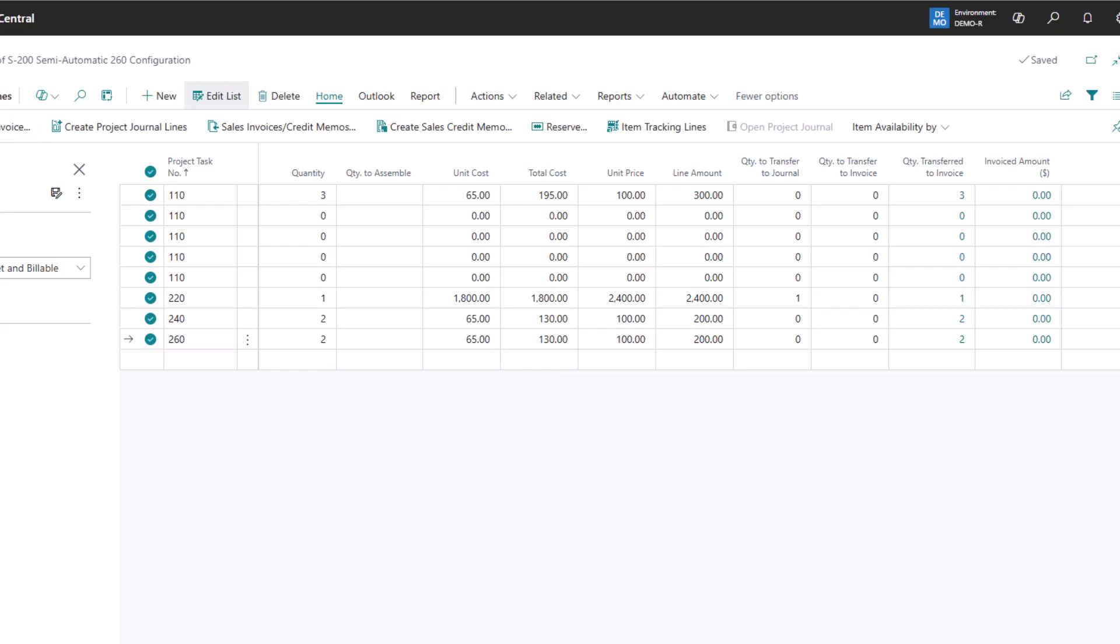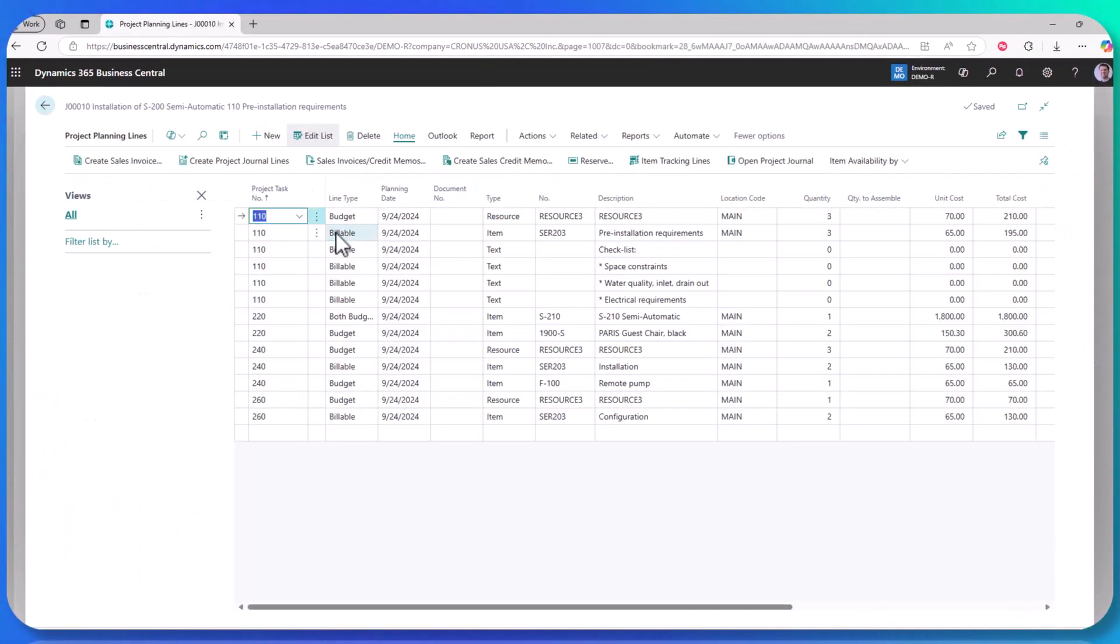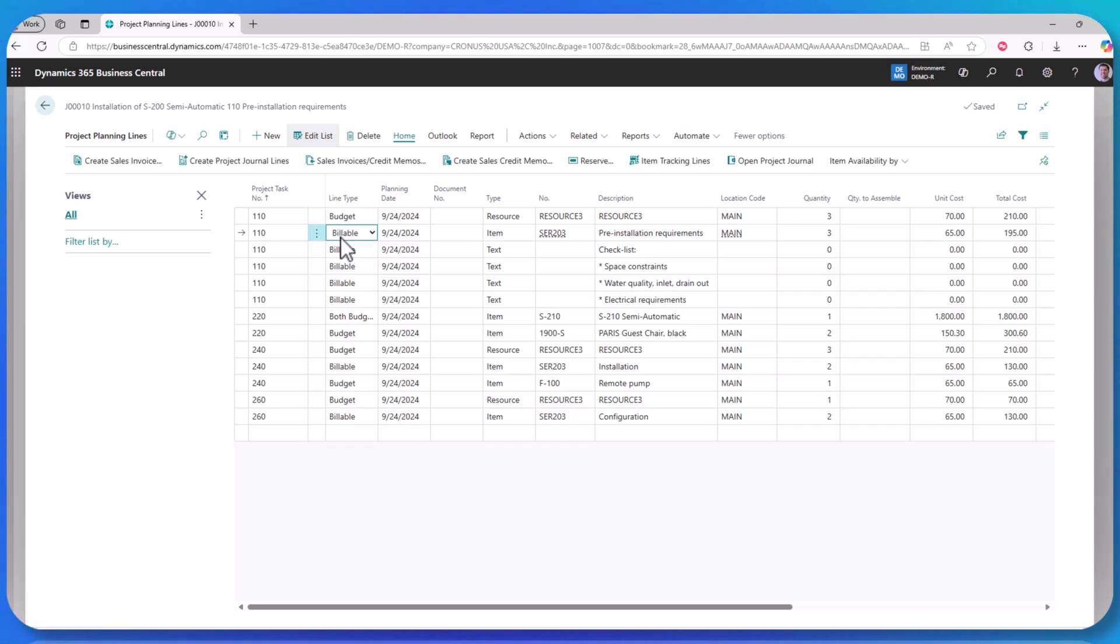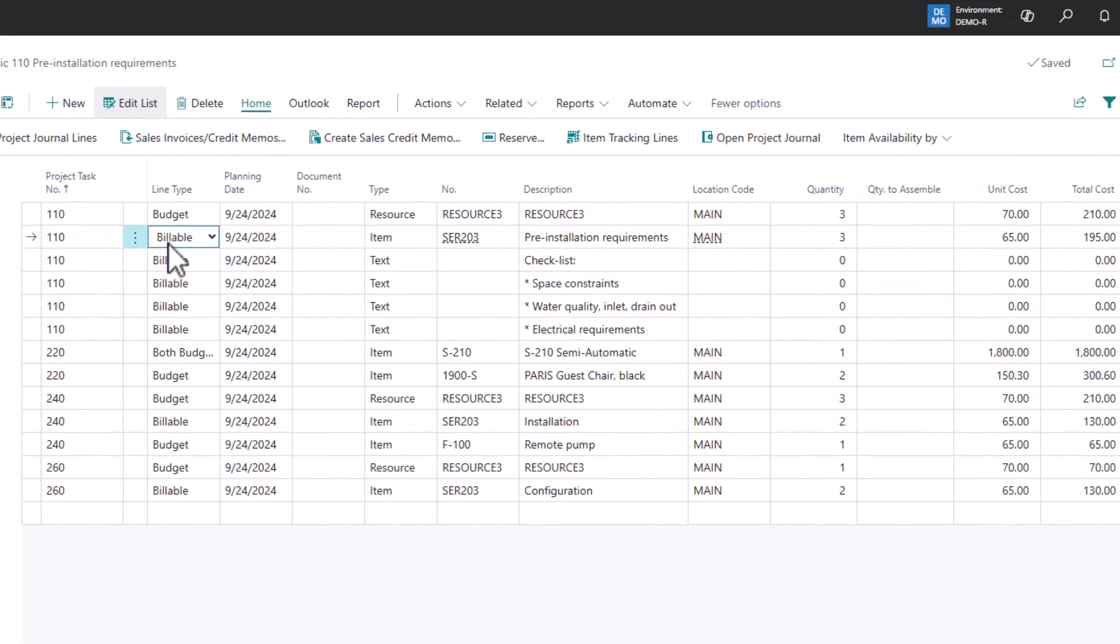So different ways to do it. It does not matter how your planning lines are created. So whether I create these on the tasks themselves, or if these are created through the time and material project journal, where I'm posting the entries of who did the work, what material was used. But when I'm making that entry, I'm marking it as billable, because I want to in a true time and material type billing, whatever work is incurred, I'm going to turn around and bill for it. And so as I'm recording my actual costs, I can mark them as billable lines, so that it builds up my project's cost, but then turns around and gives me something that I can bill for.